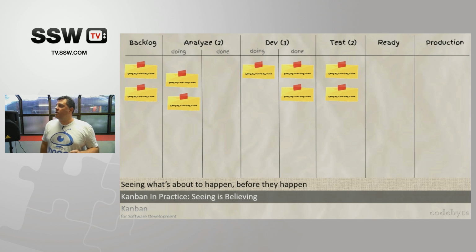How do we decide what to work on next? This is done historically by taking the highest card. So the highest card is the one that needs to be worked on. But you can, again, come up with your own system. You can prioritize them by number. You can even use user story points. I've seen teams do that, right? Whoever is highest, you can pull that. That's, again, up to you. It's something that you need to come up with. You need to decide with your team how your development process should do that.